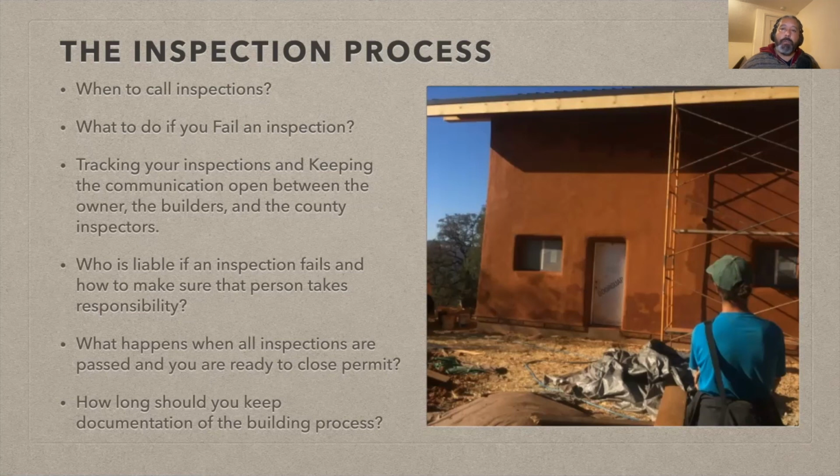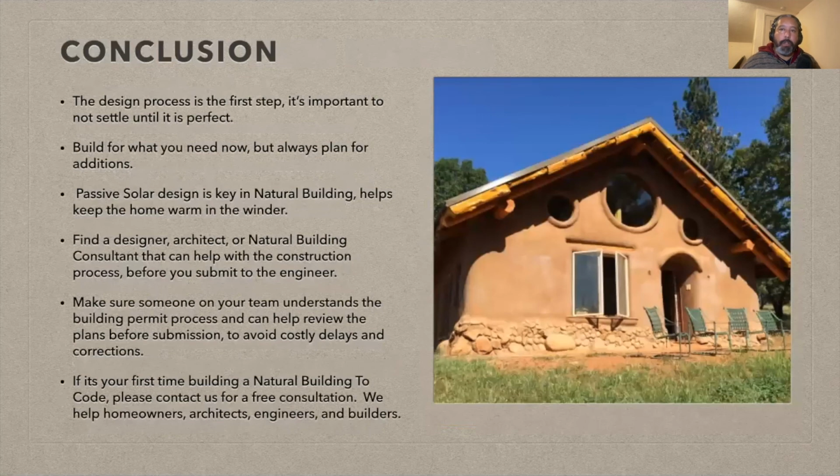So they will give you the information in terms of warranties, and then they'll give you what you need to have on hand to be able to get those warranties. And if something goes wrong with the building, you'll be able to contact them. They'll know who the subs are to fix it. You have up to 10 years in California for any structural or building warranty that the builders do. If it's something like appliances, something that has nothing to do with the building itself, that's up to you.